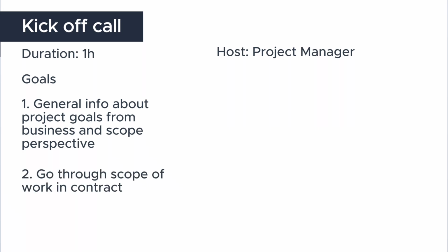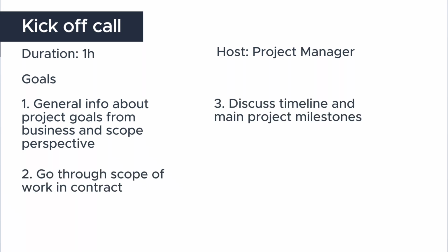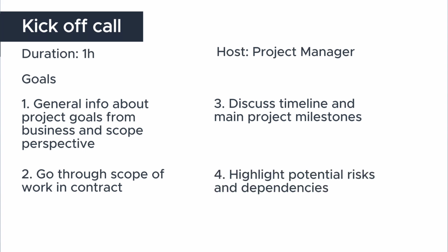Number two, go through the scope of work in the contract. Number three, discuss the timeline and main project milestones. Number four, highlight potential risks and dependencies. And the call is going to be closed out with a Q&A session with the whole team. In the insights, I will share some thoughts on how to make the kickoff productive.